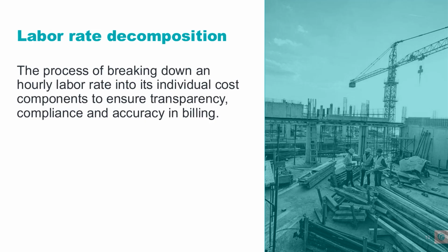For example, we recently helped perform an upfront analysis for a client where we helped negotiate and reduce the labor burden percentage applied to their base wages down from 63% to 61%. So 2% on the surface may not seem like a very significant impact, but over the course of this project, this resulted in over $500,000 of savings, as it was a multi-year project, and as I mentioned, it involved thousands